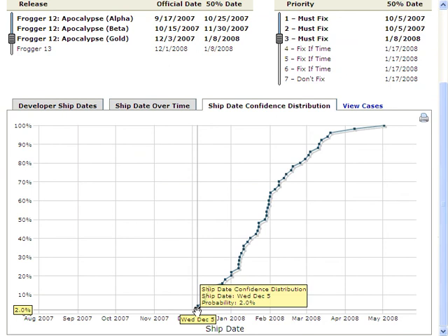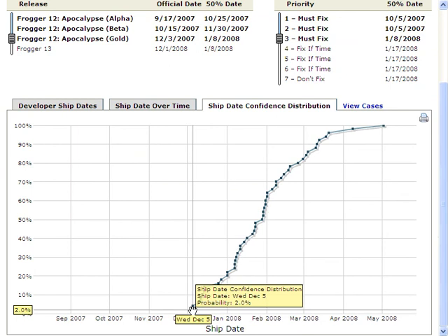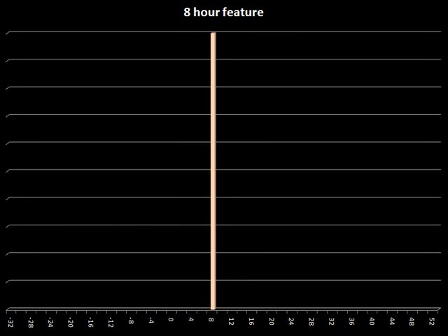I don't get it. How does FogBugz know to do this? Does it just add up the estimates? No. That would be easy. But wrong. Why? Well, imagine that you estimated some feature is going to take 1 day. Got it. 8 hours. Right. You imagining that? I'm imagining an 8-hour estimate. Could it take 16 hours? What do you mean? It's an 8-hour feature. That's just the estimate. Could it take 16 hours in reality? Yeah, I see. I suppose it could.